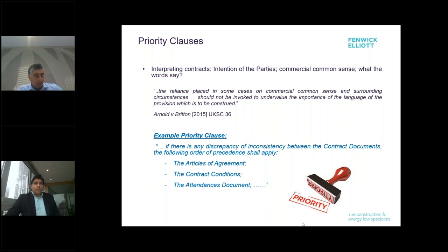And typically, when you're looking to interpret what those errors and discrepancies actually mean, how it should play out, people often look at, well, what was the intention of the parties at the beginning when they entered into the contract? What makes commercial common sense? But the Supreme Court case there below of Arnold and Britton is worth noting because it's a definite shift towards a more literal approach. And the court saying, we're not going to put on our superhero's outfit and redraft the contract for you. We've actually got to look at the words in front of us.